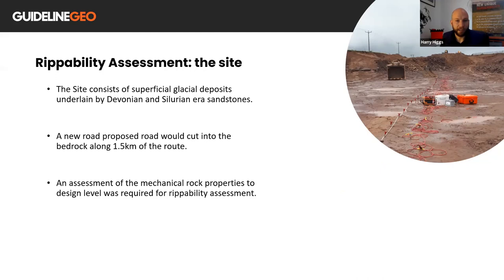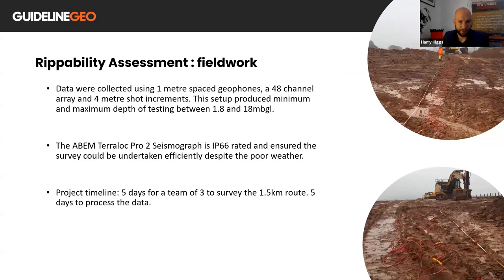Excavation had already begun, so some of the survey was directly onto bedrock, as shown in this photo. Data were collected using 1-meter spaced geophones. We used a 48-channel array with 4-meter shot increments. This setup produced a minimum and maximum testing depth of approximately 1.8 meters minimum and 18 meters maximum. The TerraLock Pro 2 seismograph is IP66 rated, and that ensured that the survey can be undertaken efficiently, despite the foul weather. And the project timeline for a team of three to survey this 1.5-kilometer route took five days.